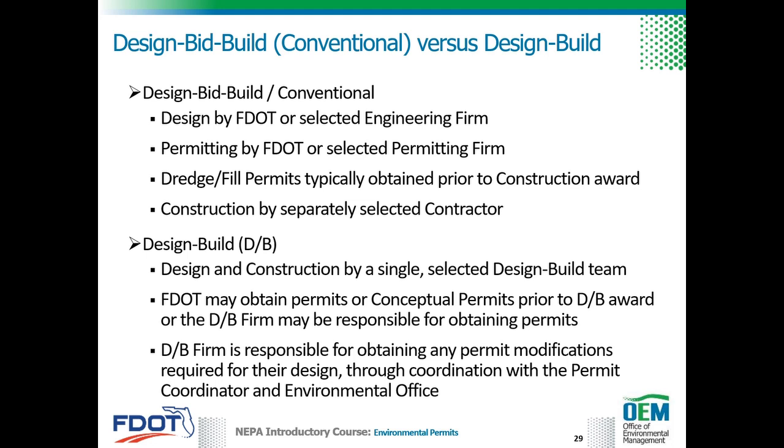The difference between design bid build versus design build processes from a permitting perspective is the timing of permit acquisition. Design bid build projects are awarded with completed permits, which are issued prior to letting.